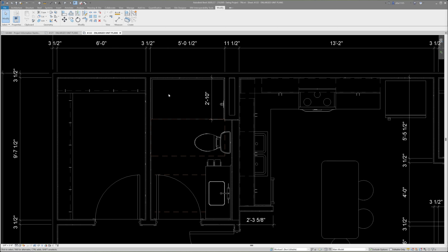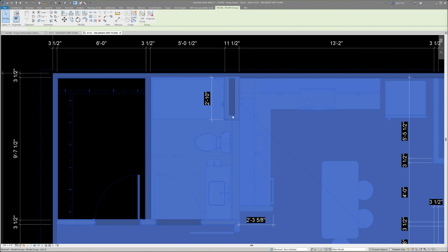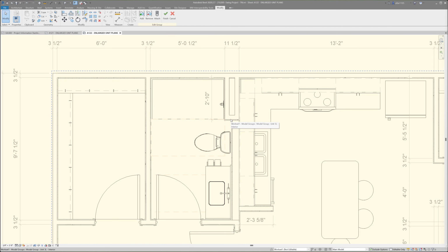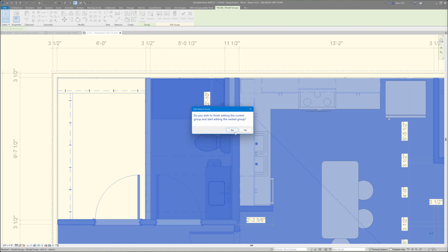One of the things I see all the time is that folks haven't left enough room for the rated wall drywall to blow by or go basically behind a tub or behind the shower. They come in and they will install this in mud and tape and install this drywall before they put the tubs in. So on this particular instance, I would probably go back on this one. And this is true for the rough openings too.